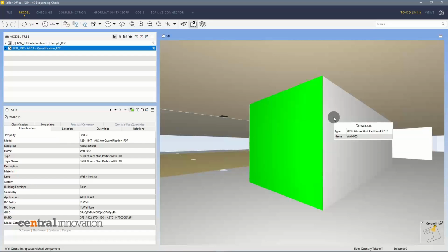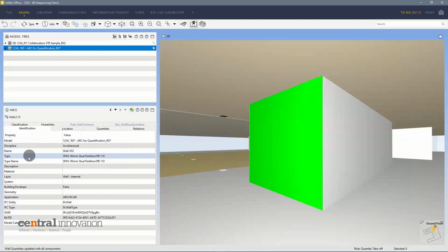You want to typify either building elements like walls, floorings and ceilings, which are based on different skins over a layer, or individual specific elements like counting doors, windows, panels, furniture, joinery, lamps, etc. So you want to keep types, and you will see that the types in here in Solibri, which are coming from the IFC, are called type, and then I can tell that somehow that looks like my composites, but they have a number at the end.